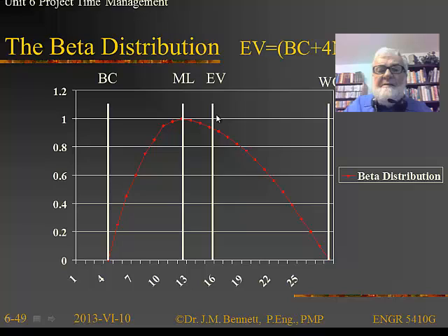No matter how fast I go, my car just will not go that fast. But on the right-hand side, the worst case here could be far worse than 30 minutes. If you think of a giant snowstorm in February with sleet and freezing rain and hail, and then a big accident that shuts the 401 down, it could take me 5 hours to get to work. So this is stretched out far, far to the right. And what we're basically saying is that the expected value is going to be shifted to the right. And so this is just a 3-point estimation. This is a beta distribution where we can actually use the distribution to automatically generate times which, if we plotted them, would follow this graph.